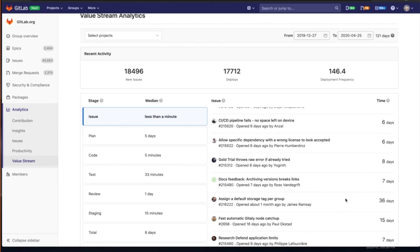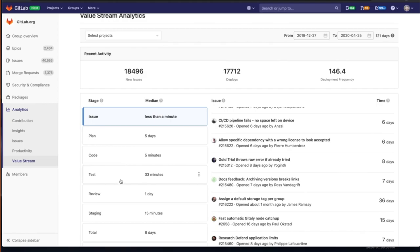And we are able to take this live dashboard and look at seven stages that are defined that are actually default out of the box with GitLab. So we have issue, plan, code, test, review and staging, and then that total that is taking all those and giving us a summary of that amount of time that's spent.